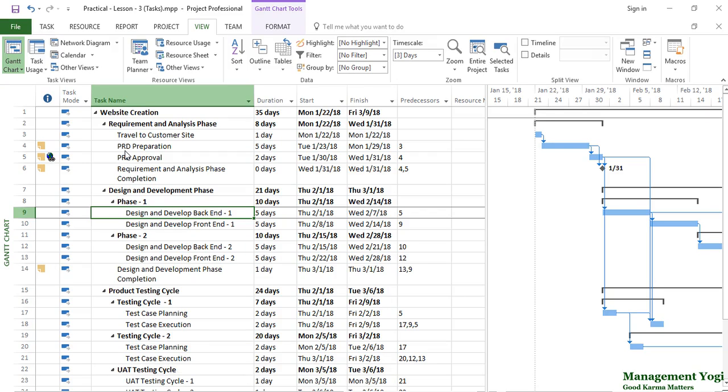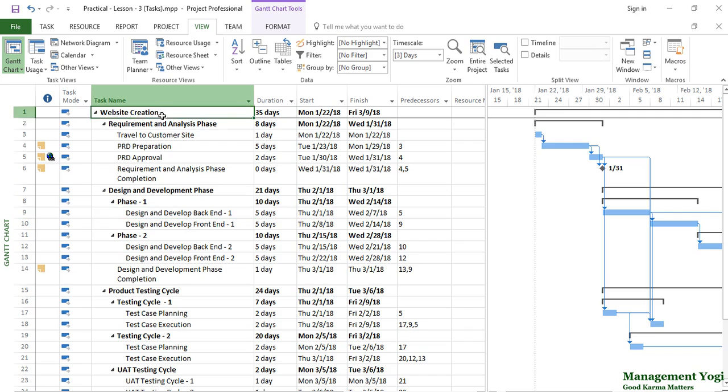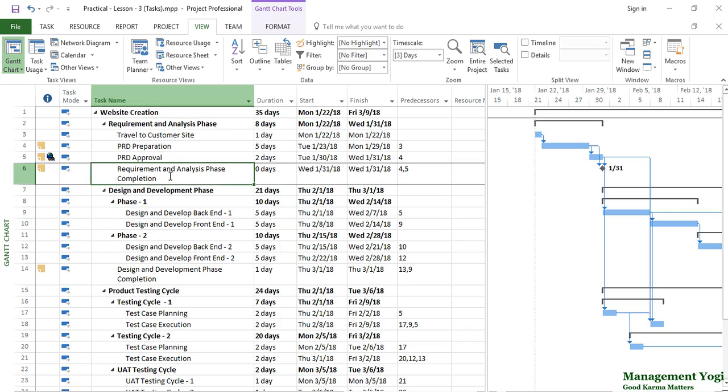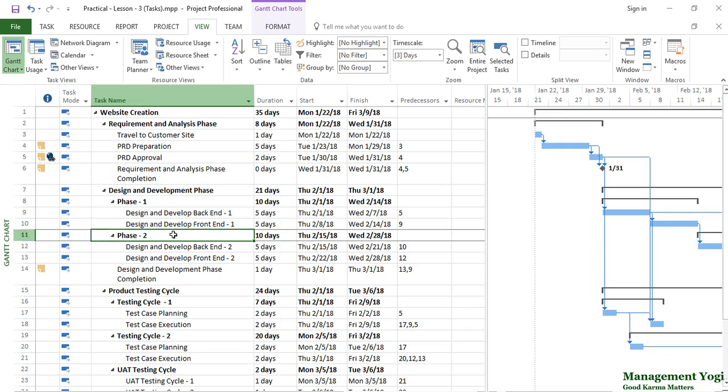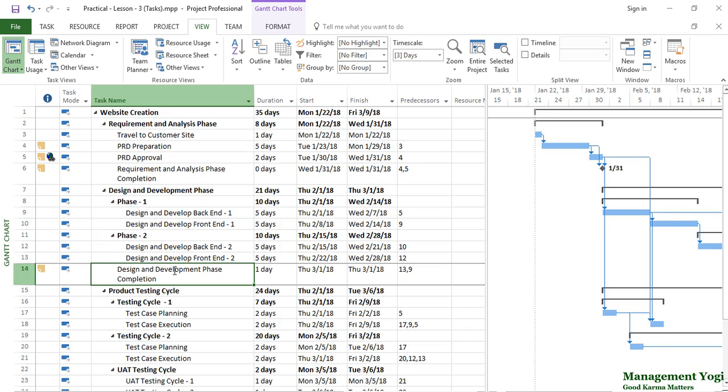When you create your WBS, a key concept is the WBS code, also called WBS ID or identifier. Every element in the WBS is uniquely identified by this ID. The elements in a WBS are each item - this is one element, this is another element. Each item in the WBS can be uniquely identified by this WBS ID or code.